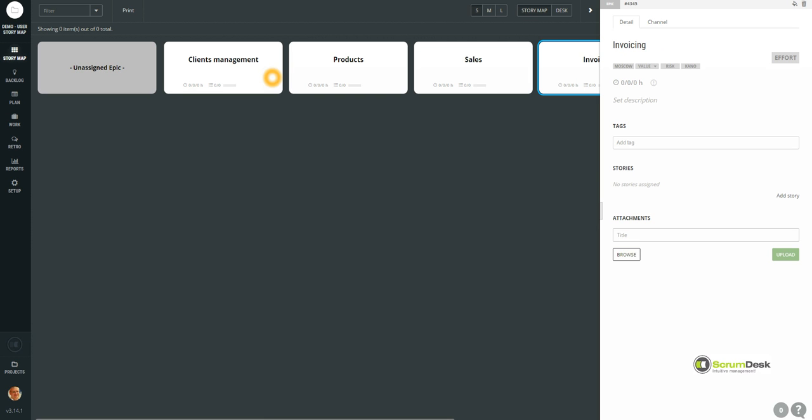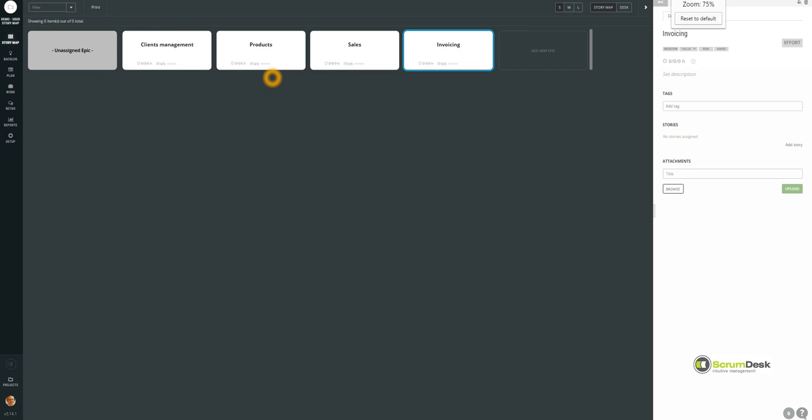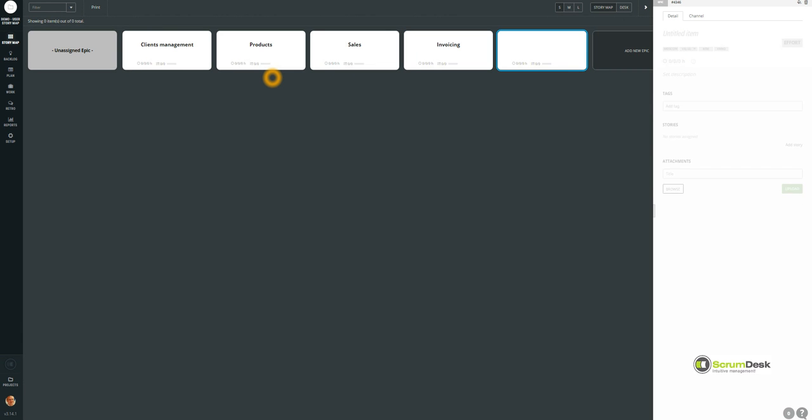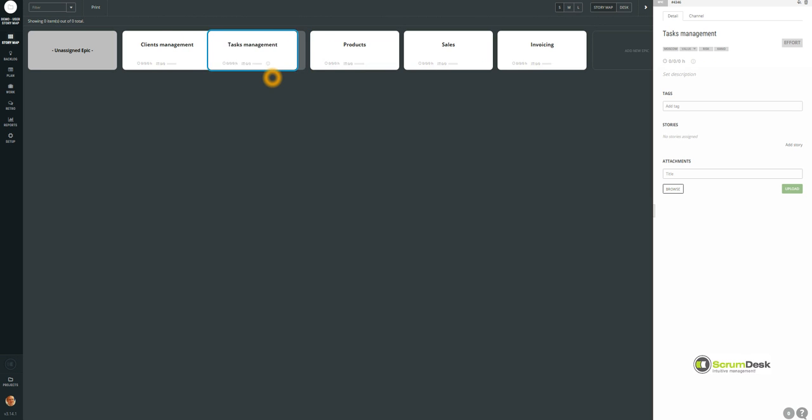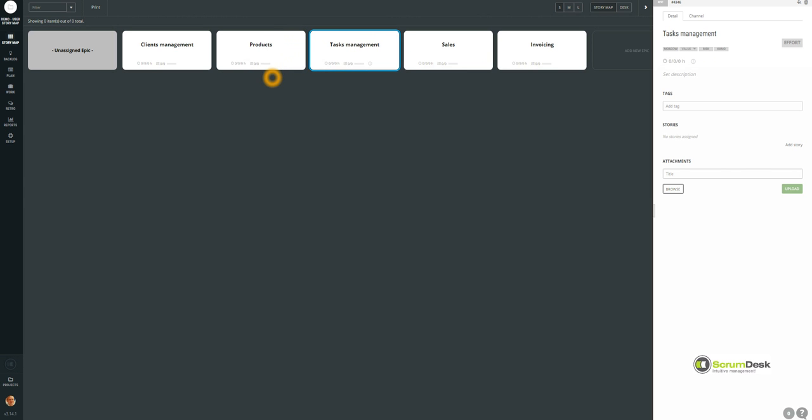And the last thing will be maybe about invoicing. Maybe we decided that we need additional things as well, and one of them might be a kind of task management. As task management is maybe more important for the product at the beginning than sales, because there needs to be some tasks done before the sales is completed, we can change the order of the epics based on priorities according to your requirements.